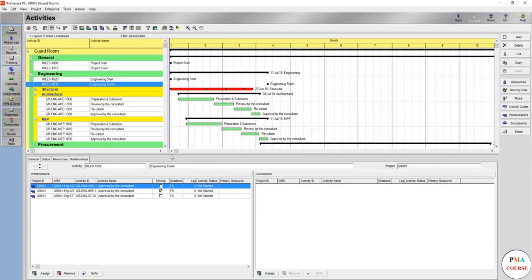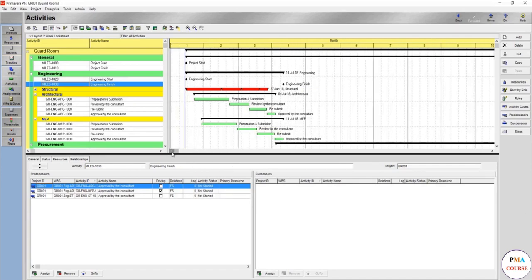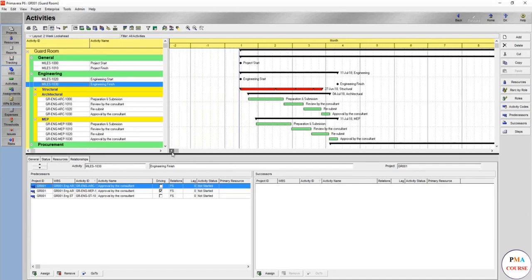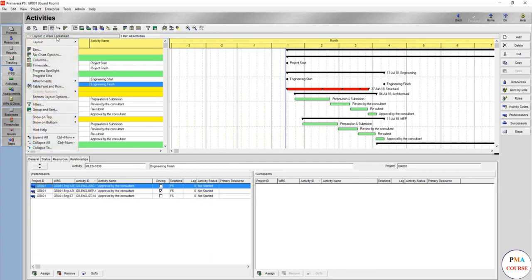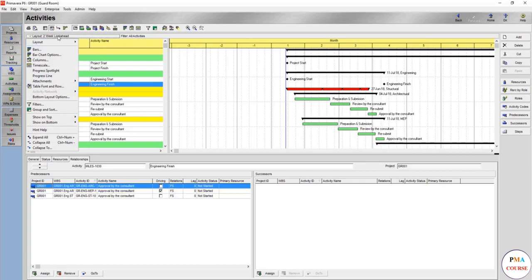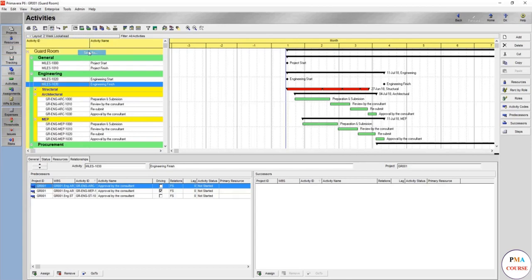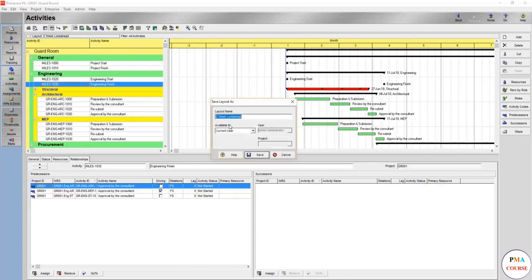So now it appears good and you have it ready. For example, you want to save this view. You'll go to the layout, layout save as, because if you press save, this means it will be saved in the two weeks lookahead view. So you want to save as.